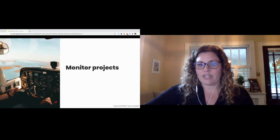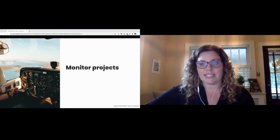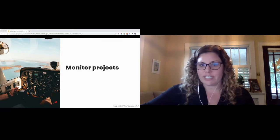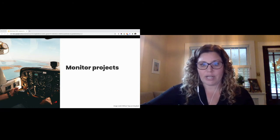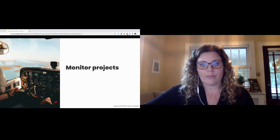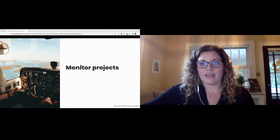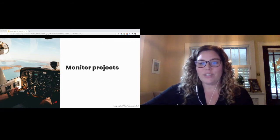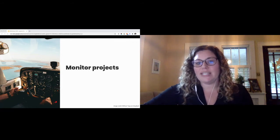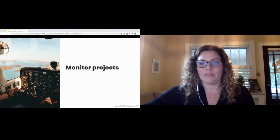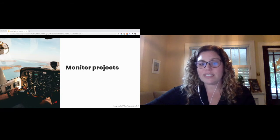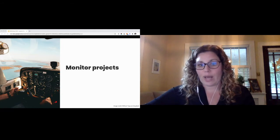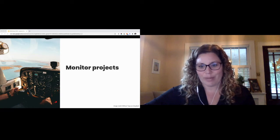A big part of my personal process is making sure I have systems and tools in place to allow for independent project monitoring. This would include setting key metrics in place, such as budgets and time tracking, task tracking, and getting appropriate notifications. This way, I can have the knowledge about a project and how it's performing without bothering my team. For instance, we set up a Slack channel for each project called Bots, and that pulls in key notifications from JIRA. We also use Harvest for time tracking, and we can set up reports there to get emailed when a percentage of the project budget is used. All of these can be helpful little signals that tell me that things are going well or tell me that I need to stop everything and dig in for more information.